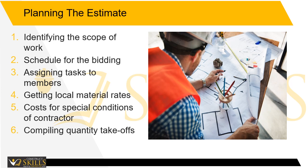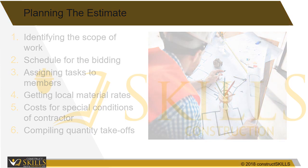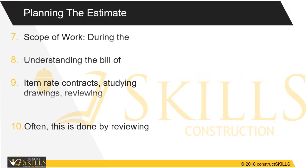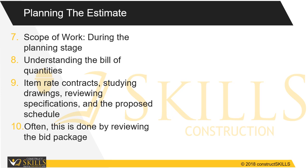Typical tasks involved are getting local material rates, getting quotes from subcontractors, compiling costs for special conditions of the contractor, and compiling quantity takeoffs. During the planning stage, the estimator needs to identify the general scope of work covered by the bid package.